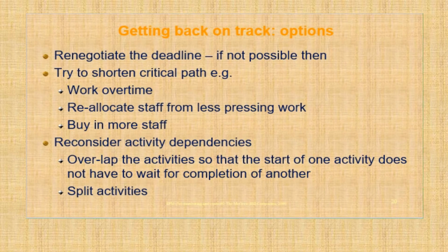Try to shorten the critical path. So what do you mean by this? Shorten the critical path means we are trying to get the thing done more quickly, and how can this be possible? This is only possible if we add more resources, more staff to my project. So an example given is work overtime. So maybe adding staff or adding more working hours means we are spending more time doing that particular work.